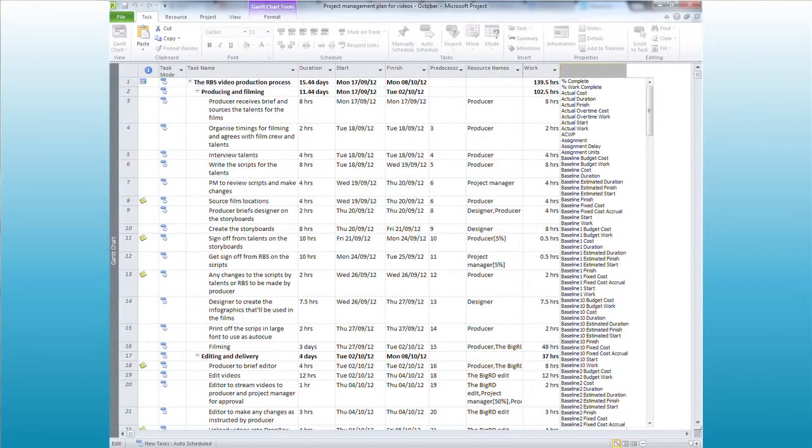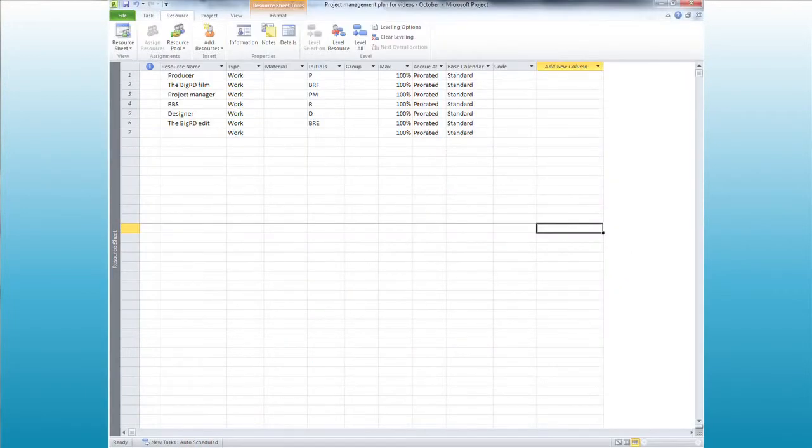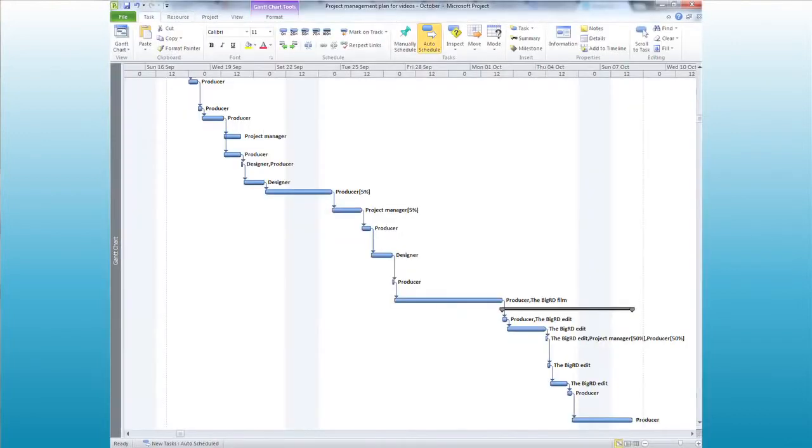Risk assessments are important as they help you understand how unplanned events may impact your project, what needs to be done to minimise those risks, who needs to do it, and the potential consequences of a delay or undelivered part of your project. Microsoft Project and similar planning software are great as they allow you to order tasks that are low level but required in order to achieve a much greater goal. Highlighting these dependencies will help you have a clear understanding of what tasks need to happen before others and how a delay could affect the timeframes and budget for the project.